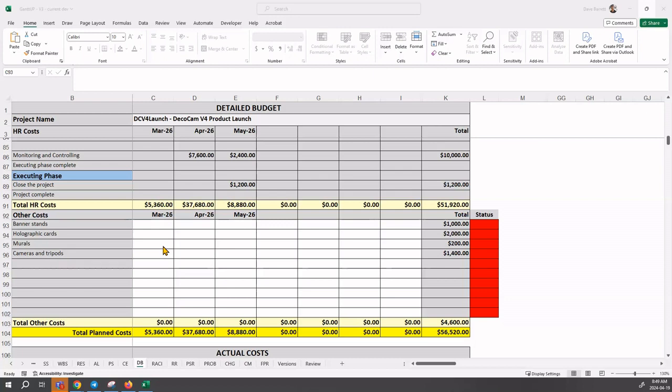But Gantup can't go to the schedule and pick out which month they will occur in, when the expenses will occur. So that's something that you have to enter. Notice the status is red, indicating there is currently a problem with these four rows.